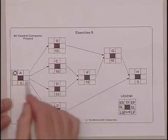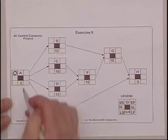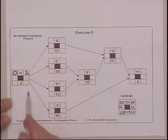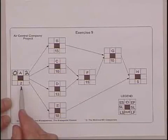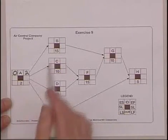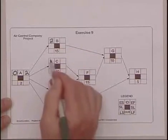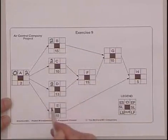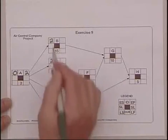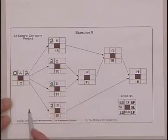So now we simply add and move, do what the text calls the forward paths. And so the earliest at activity A, if it takes two days, it will be done on the second day. That's the earliest it can be done. Then B can start once A is done. So can C, so can D, and so can E. The earliest start is the early finish for the preceding activity.